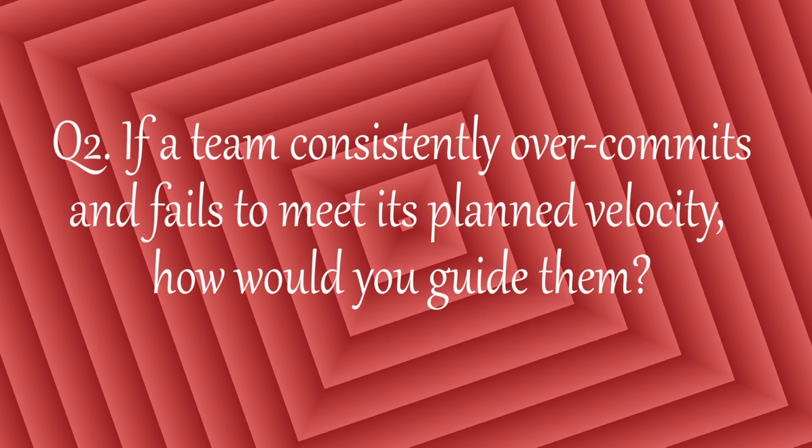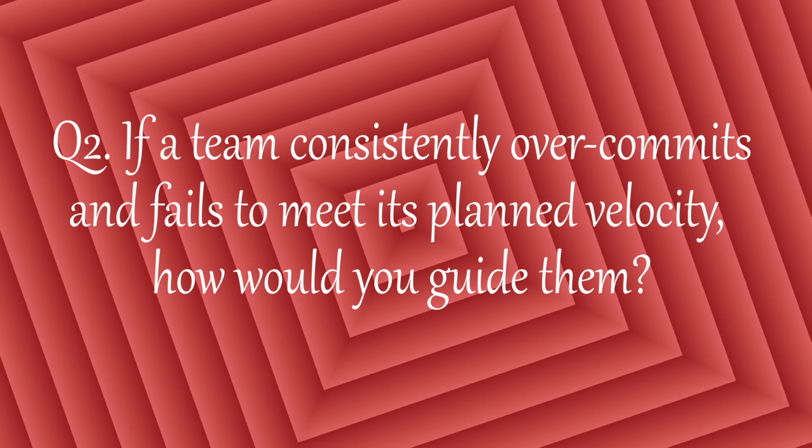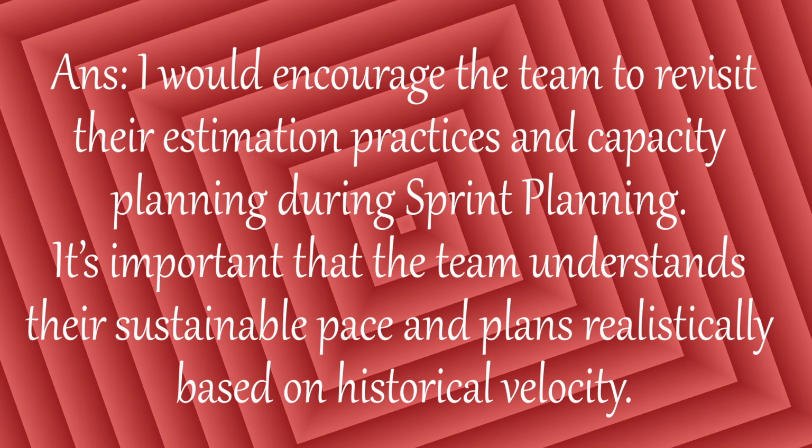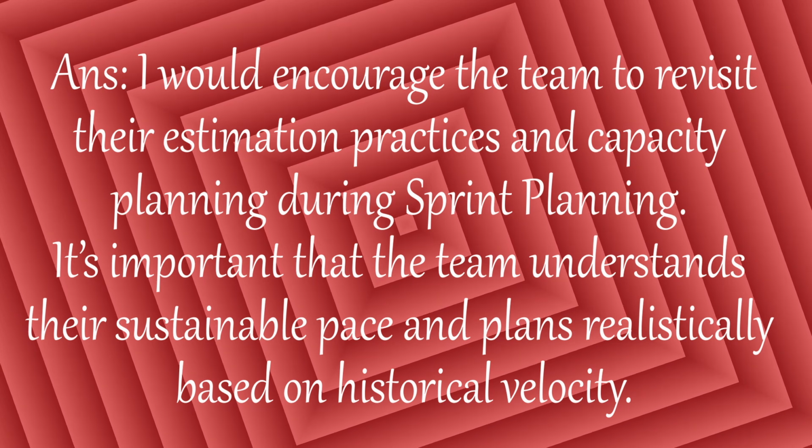Q2. If a team consistently overcommits and fails to meet its planned velocity, how would you guide them? Answer. I would encourage the team to revisit their estimation practices and capacity planning during sprint planning. It's important that the team understands their sustainable pace and plans realistically based on historical velocity.